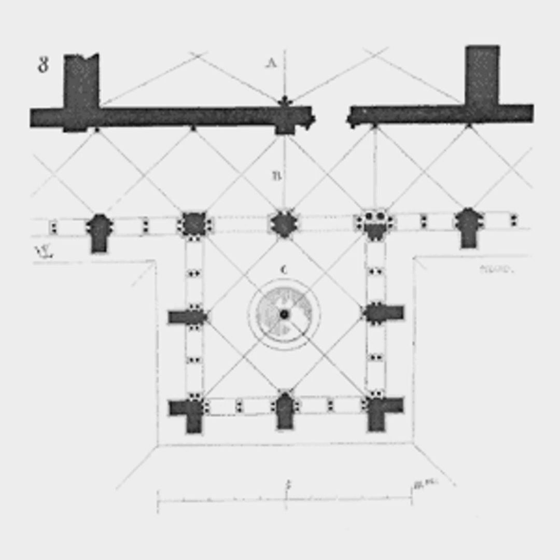And also, another form of that is when the cost of making changes affects your ability to actually implement any changes. The later you go into the program, the more components and materials and processes are set up to move your product along the life cycle. And so implementing a change as you head into production is a whole lot more expensive than it is when you're in concept phase and early design phase.